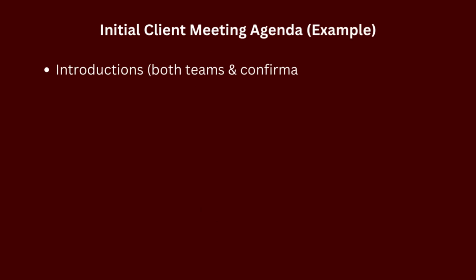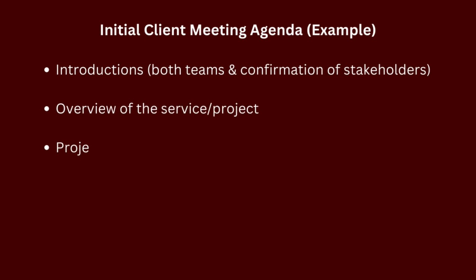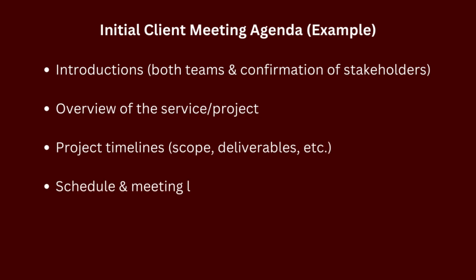So project-wise, there are a couple really important key factors that you'll typically discuss during your first meeting. The project manager will likely create the decks that you'll be reviewing during that client call. Oftentimes, the slides will include introductions, introducing both teams, an overview of your organization to any stakeholders who may not be familiar, the project timelines and the estimated deliverables, the scope, any logistics in terms of how teams will meet and share information, and then there will be a breakdown of action items and then next steps as well.